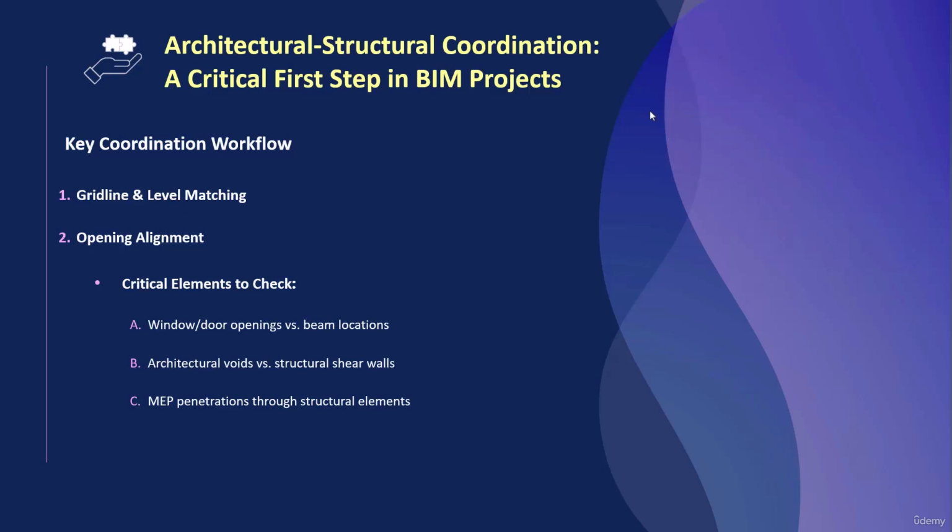There was a project we recently implemented in a Revit model, a cancer center, that had this problem in its architectural and structural plan. When we reported it, they told us that the architecture plans were closer to the final design than usual, so we should put the architectural plans on top. So one of the most important things you should do is check the interferences of the structural plan.